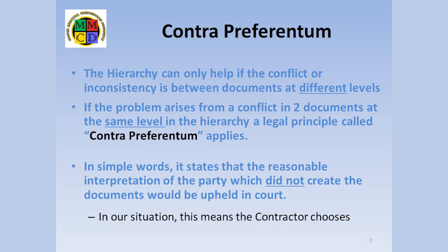But the document hierarchy cannot solve all conflict problems on its own. It only helps when the conflicting information occurs in documents at different levels in the hierarchy. When the conflict occurs in documents at the same level, a legal principle known as contra preferentum applies. This principle sets out that the party which did not draft the documents gets to have their reasonable interpretation upheld. What this means in a construction scenario is the contractor gets to choose which of the two conflicting instructions to follow.